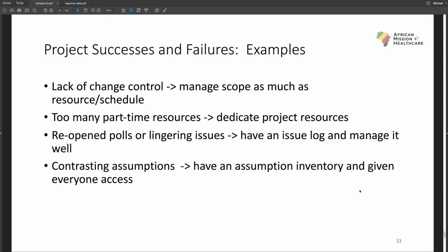An example in my past was that we had a set of transactional capabilities so that customers could interact with the company. That was the basic scope of the project. Some of the clients wanted to start building some informational capabilities where they could assess the transactional data and look at it in an analytic lens. While it makes complete sense to do, we executed change control to say, hey, look, that's a different project. Let's do that project if it's important, and of course it was. But let's not make it part of this project. Let's finish this project successfully and use that as a foundation to do the next project. So change control is very, very important.